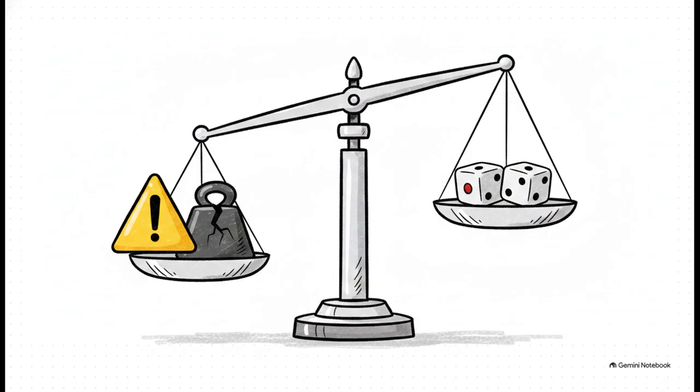To figure out your risk rating, deciding whether a risk is high, serious, medium, or low, you have to weigh two factors against each other: severity versus likelihood. Severity asks, how serious would the potential environmental impact be if it actually happened? While likelihood asks, what is the actual probability of that impact occurring in the first place? Balancing these two factors dictates just how aggressively you need to plan out your environmental controls.